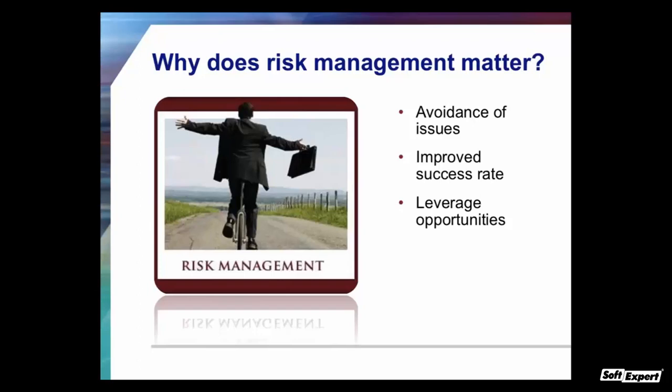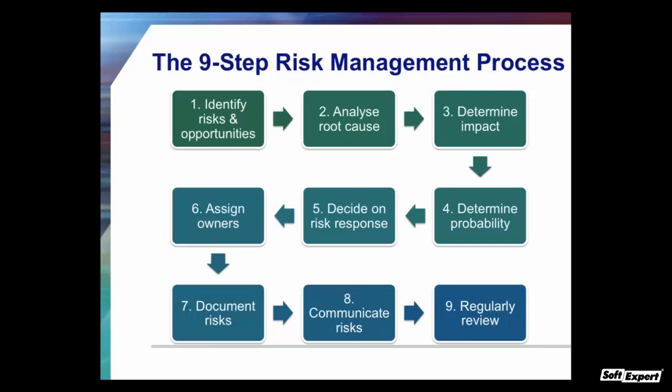We're now going to go through the nine-step risk management process. The first step is to identify risks and opportunities — positive as well as negative. Then we analyze root causes, determine impact, and determine probability. Only then can we decide on the risk responses and who will own them. Next, we document risks in a risk log, communicate risks at weekly status meetings and steering committee meetings, and finally, review what we're doing regularly. We want to be leaders, not just managers — so let me remind you of the differences between management and leadership.